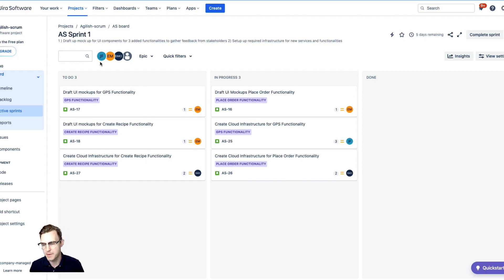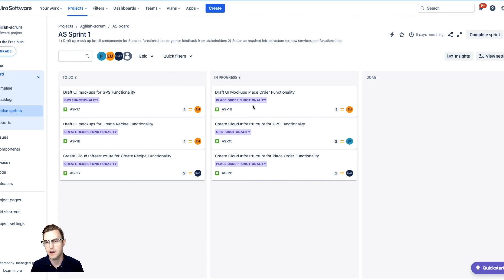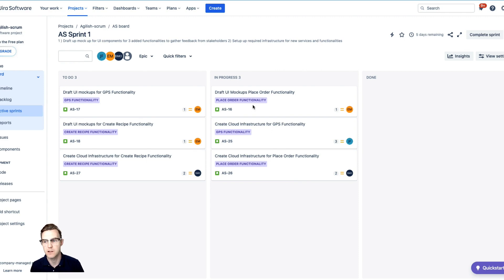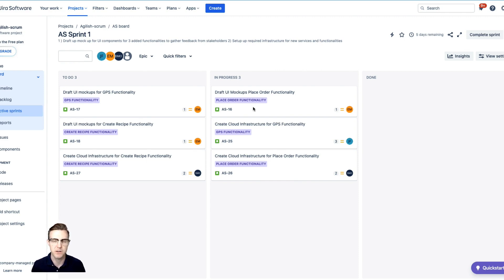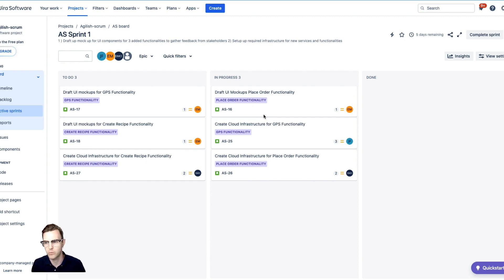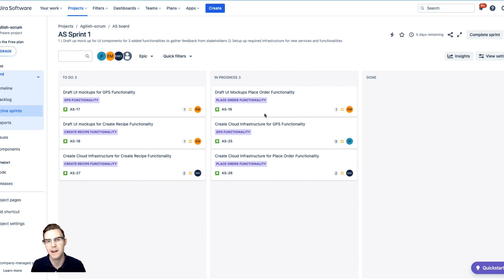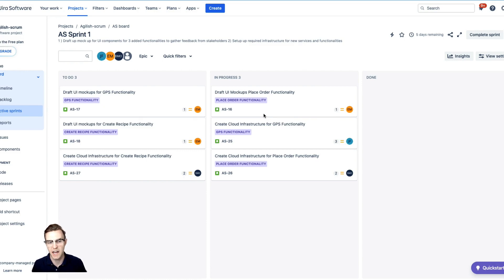One thing, another item here that I check is movement in tickets. So if these are stuck in progress for maybe two to three days and I'm expecting some kind of comments or something else on it, movement, maybe some commits or pull requests and nothing's happening, this is where to ask questions. Instead of what did you do yesterday, what did you do today, ask: Hey, what's going on with AS-16? Why haven't I seen any PRs or commits? What's going on with this ticket? Is there something I can help out with? Looking at the things that are not changing, that movement in tickets throughout this process is really important.